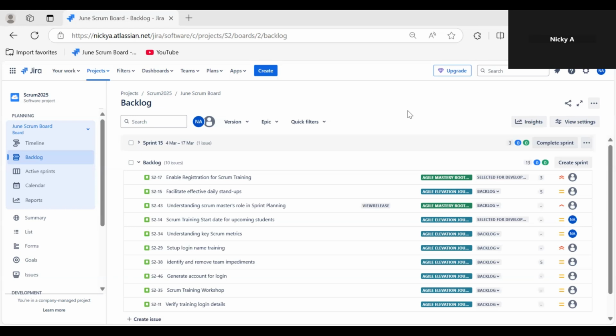Depends on where you work. Some teams are doing a 2 week sprint, some are doing 3 week sprint, some maybe even 4 weeks, but your sprint should not last longer than 4 weeks, right? So your sprint can go from 1 week to about 4 weeks. I've worked in an environment where they did a 2 week sprint, and one with a 3 week sprint. However, I've never worked in an environment doing a 4 week sprint, but I do know people that are.